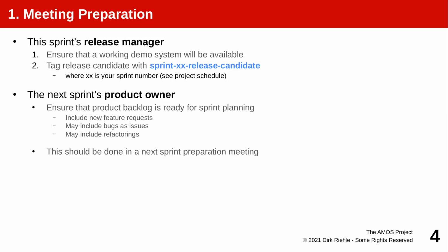Not yet an additional commit. If someone comes too late, bad luck. You should not accept their code into the release unless you're willing to make sure it builds, tests, and can be used for demoing. That's up to the release manager, but I want to see the release candidate before the meeting.